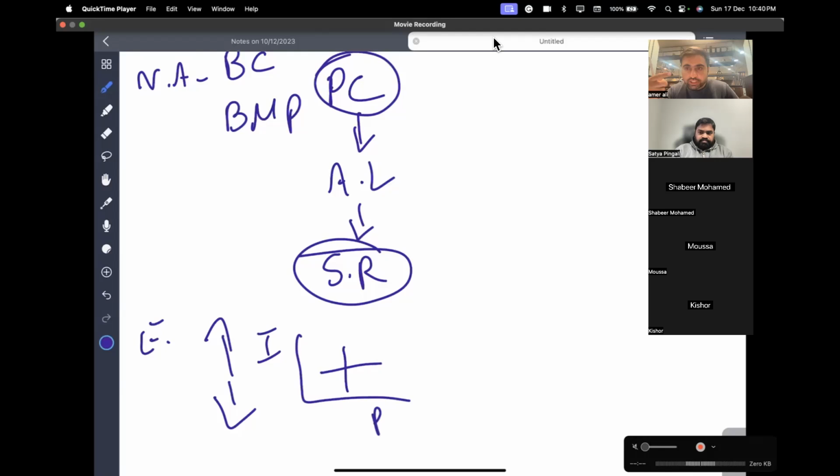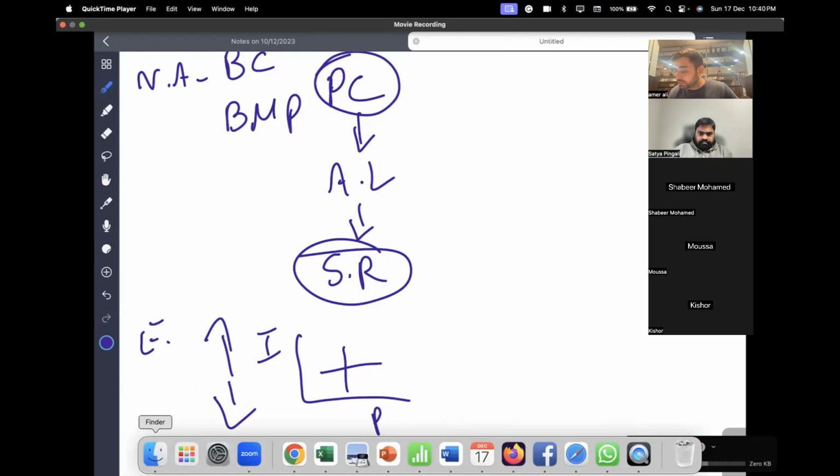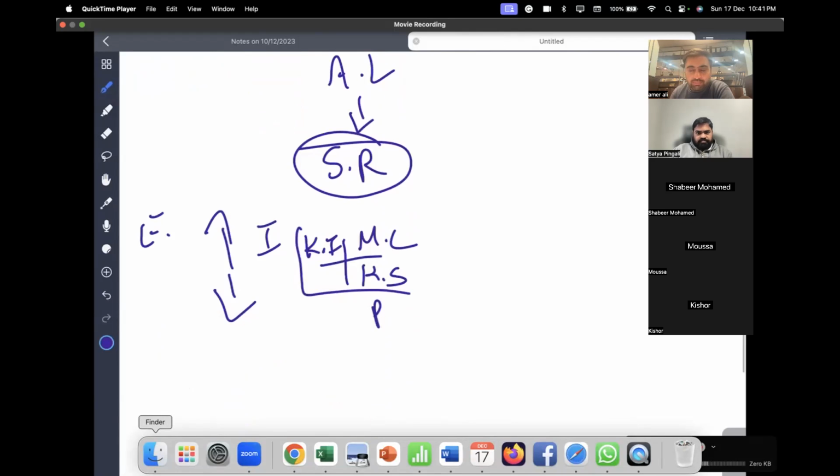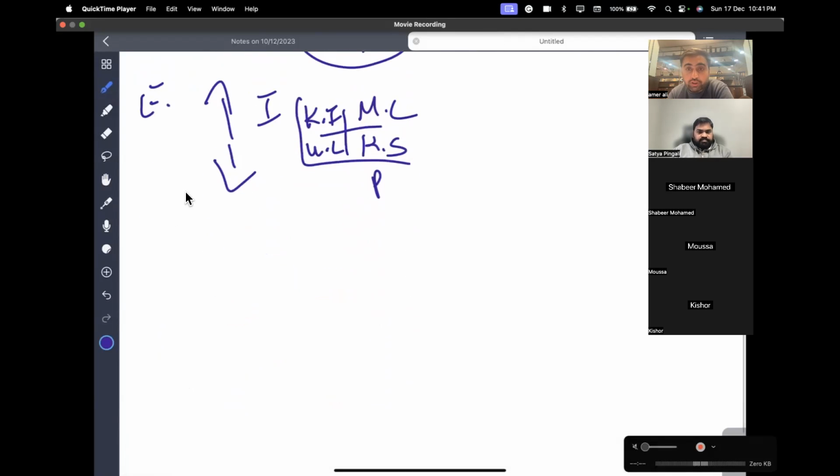Who are the important stakeholders, who are the less important stakeholders. The extremely important stakeholders, we manage them closely: high power, high interest. Those stakeholders who have high power but are not interested, we want them satisfied. Those who have no power but are highly interested, we keep them informed. And then we also make a watch list for those stakeholders who are neither powerful nor interested.